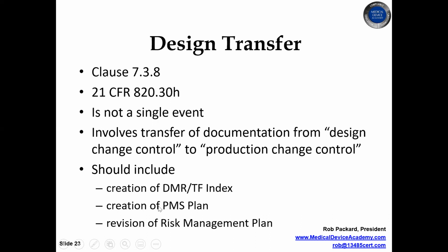This is where I recommend you create a post-market surveillance plan. Even though the FDA doesn't require it for all products, it's required in the ISO standard and it's required for CE marking in Canada. And then this is also where I recommend revising your risk management plan.